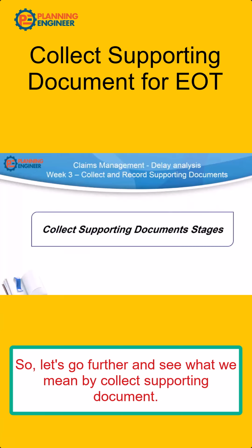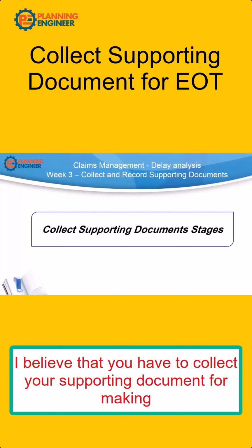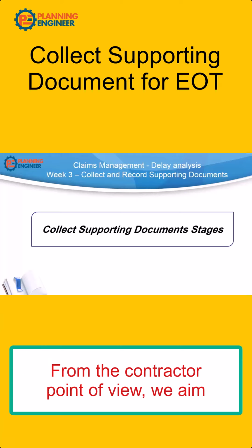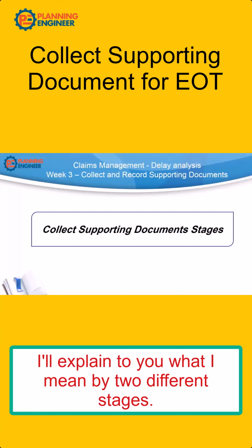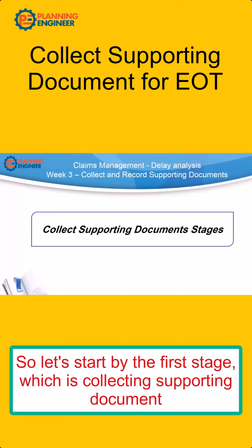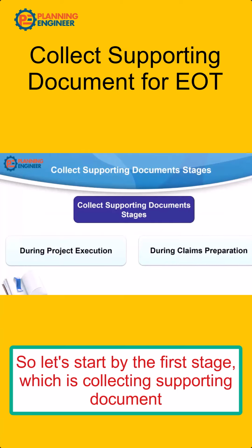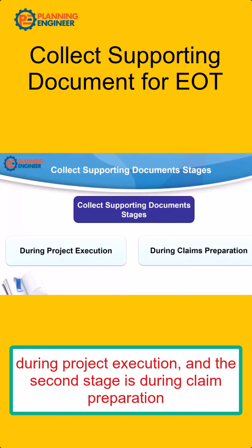So let's go further and see what we mean by collect supporting document. I believe that you have to collect your supporting document for making extension of time in two different stages. I'll explain to you what I mean by two different stages. So let's start with the first stage, which is collecting supporting document during project execution. And the second stage is during claim preparation.